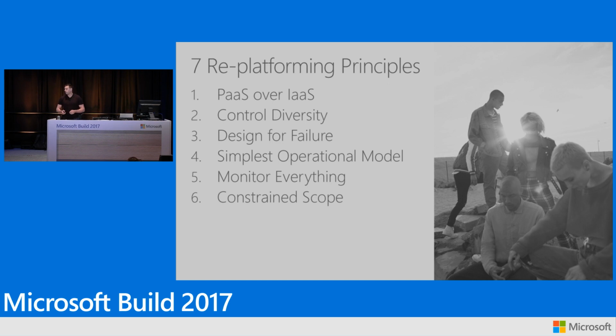We also knew that we couldn't boil the ocean and tackle everything at once, so we agreed a series of phases and scopes up front, and Owen's going to talk you through in detail how we manage those. But at a high level, for the first phase, we decided we were going to lift all of the customer experience and the services required to support that, everything up to capturing an order, getting it ready to ship down to the warehouse for shipping.